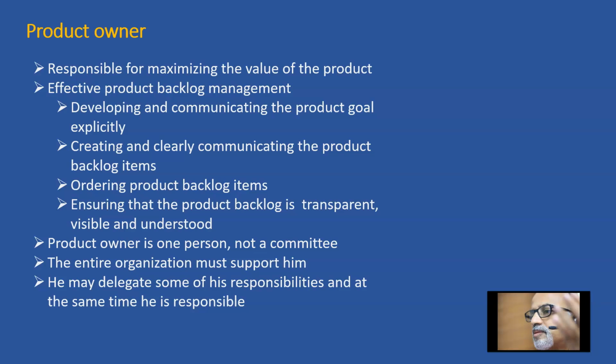So typically they use something like an Excel sheet, keep on entering the probable features that may get into the product, and then they prioritize which features should happen first. They think about a minimum viable product as well. So which are the top priority features, in which iteration it should go, and for the immediate iterations, before starting the iteration or sprint. In Scrum, the terminology for iteration is sprint. So before starting the sprint, they would have elaborated this product backlog into fully blown details.